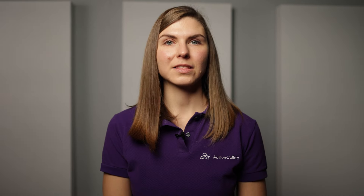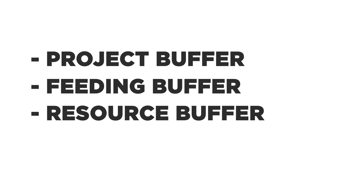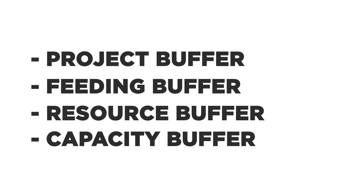Buffers. There is a lot of uncertainty around projects, and Critical Chain uses buffers to protect the project timeline and remove them. There are four types of buffers: project buffer, feeding buffer, resource buffer, and capacity buffer.